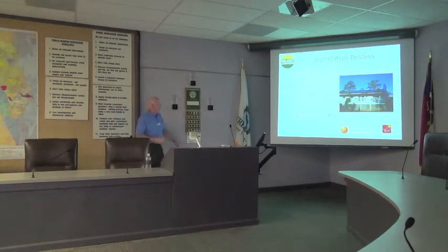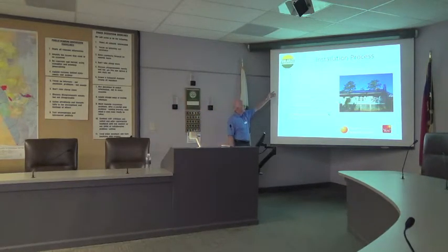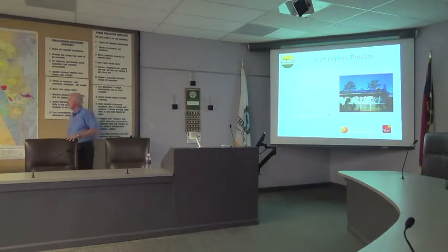Project planning and permitting. Okay, so after all of this, you say, let's go ahead with the Solarize Carrboro contract. We go ahead and start doing all our drawings. All the drawings are stamped with an engineering stamp. Everything's permitted. We'll pull permits on everything. In most instances, we'll pull both an electrical and a building permit, and we manage that process for you.